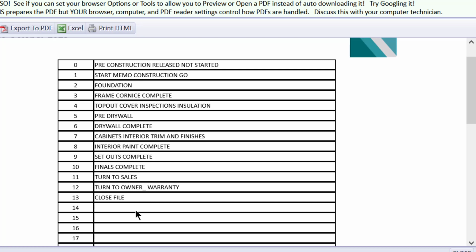And when I talk about stages, you should think of those as the points in time that you might be taking a draw from the customer or from the bank, etc., like you have these designated times. So one of the first steps when you get CHS is that it's going to ask you to set up your set of stages. Then it'll ask you to go ahead and attach some of those stages to your various cost centers so that we can do forecasting by cost or show you costs by stage, etc., and do grouping that way.